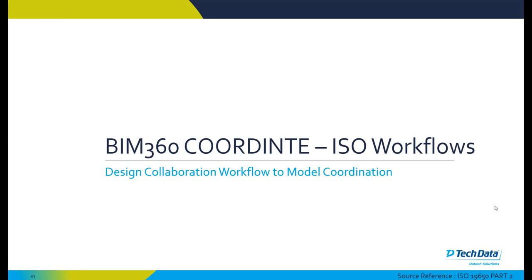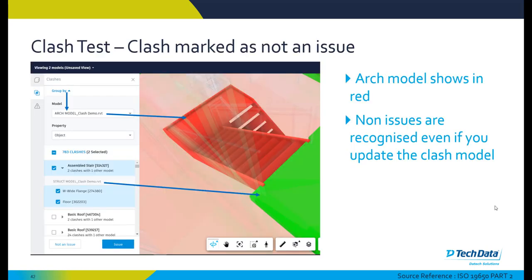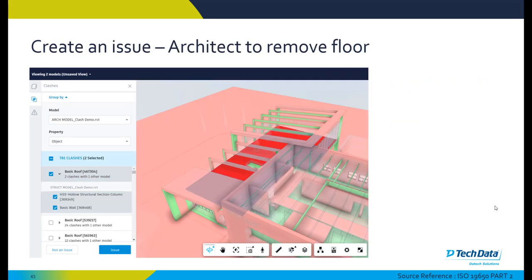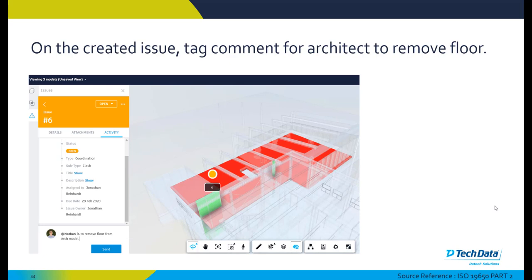Within BIM 360 coordinate we can also link the architectural and structural models, for example, or other consultant models. We can capture all of those clashes and automatically clash them from our project files folder to our plans folder within BIM 360. Any issues are captured in BIM 360 and this is part of the coordination process as required within ISO 19650. In this particular example we can see that the architect needs to remove their floor modeled within their architectural model as the structural engineer has modeled the concrete floor required for this particular model. An issue is then created and a comment for the architect to remove the floor is saved. The architect is then tagged in this particular element and they will receive a notification once we hit send.